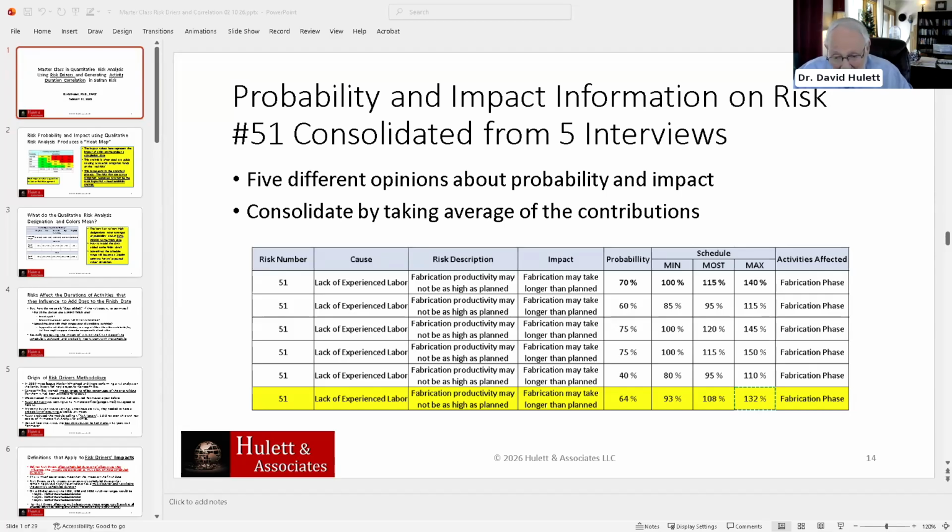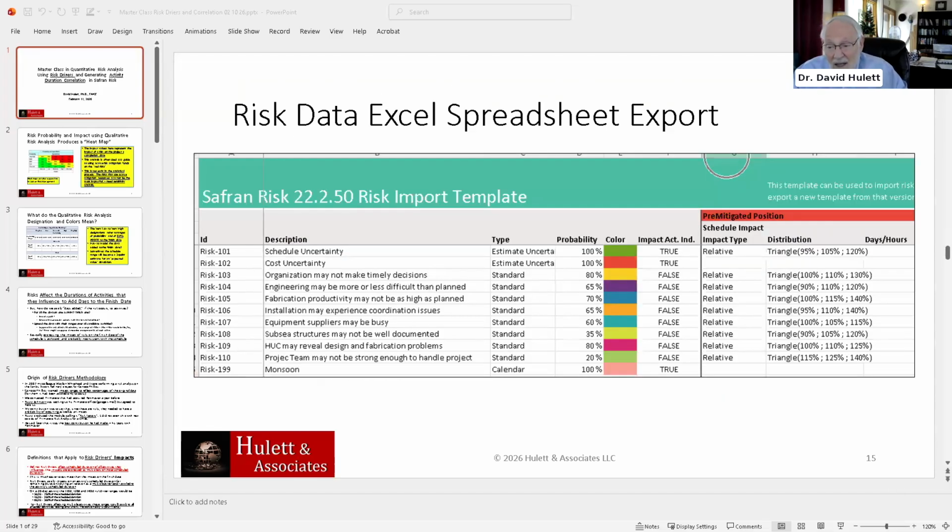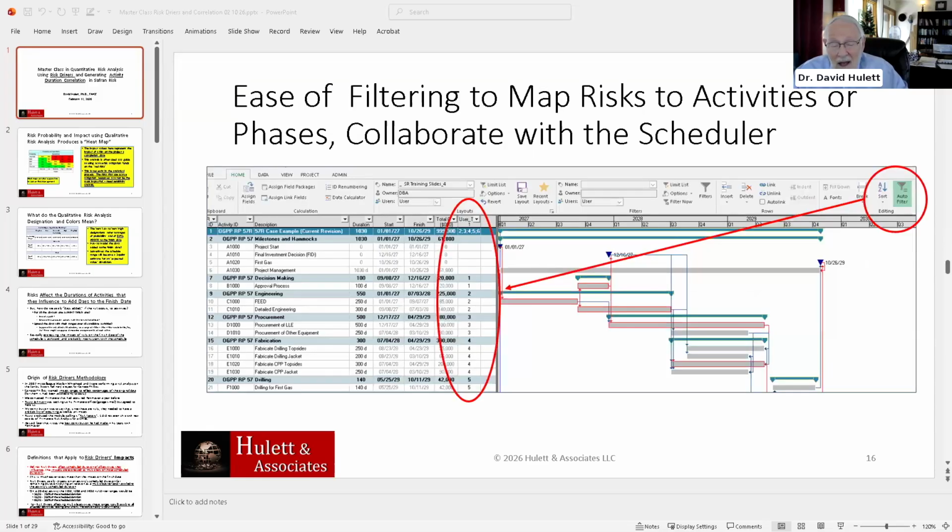They might be introducing new risks in addition to commenting on previous risks, but that's the dynamics of a mitigation exercise. We figure we could do four interviews in a day. So you got 20 interviews in a week, and then maybe there are 2 of you, so you got 40 interviews, and then you're going to consolidate them. Okay, so now, by the way, how are we going to model these?